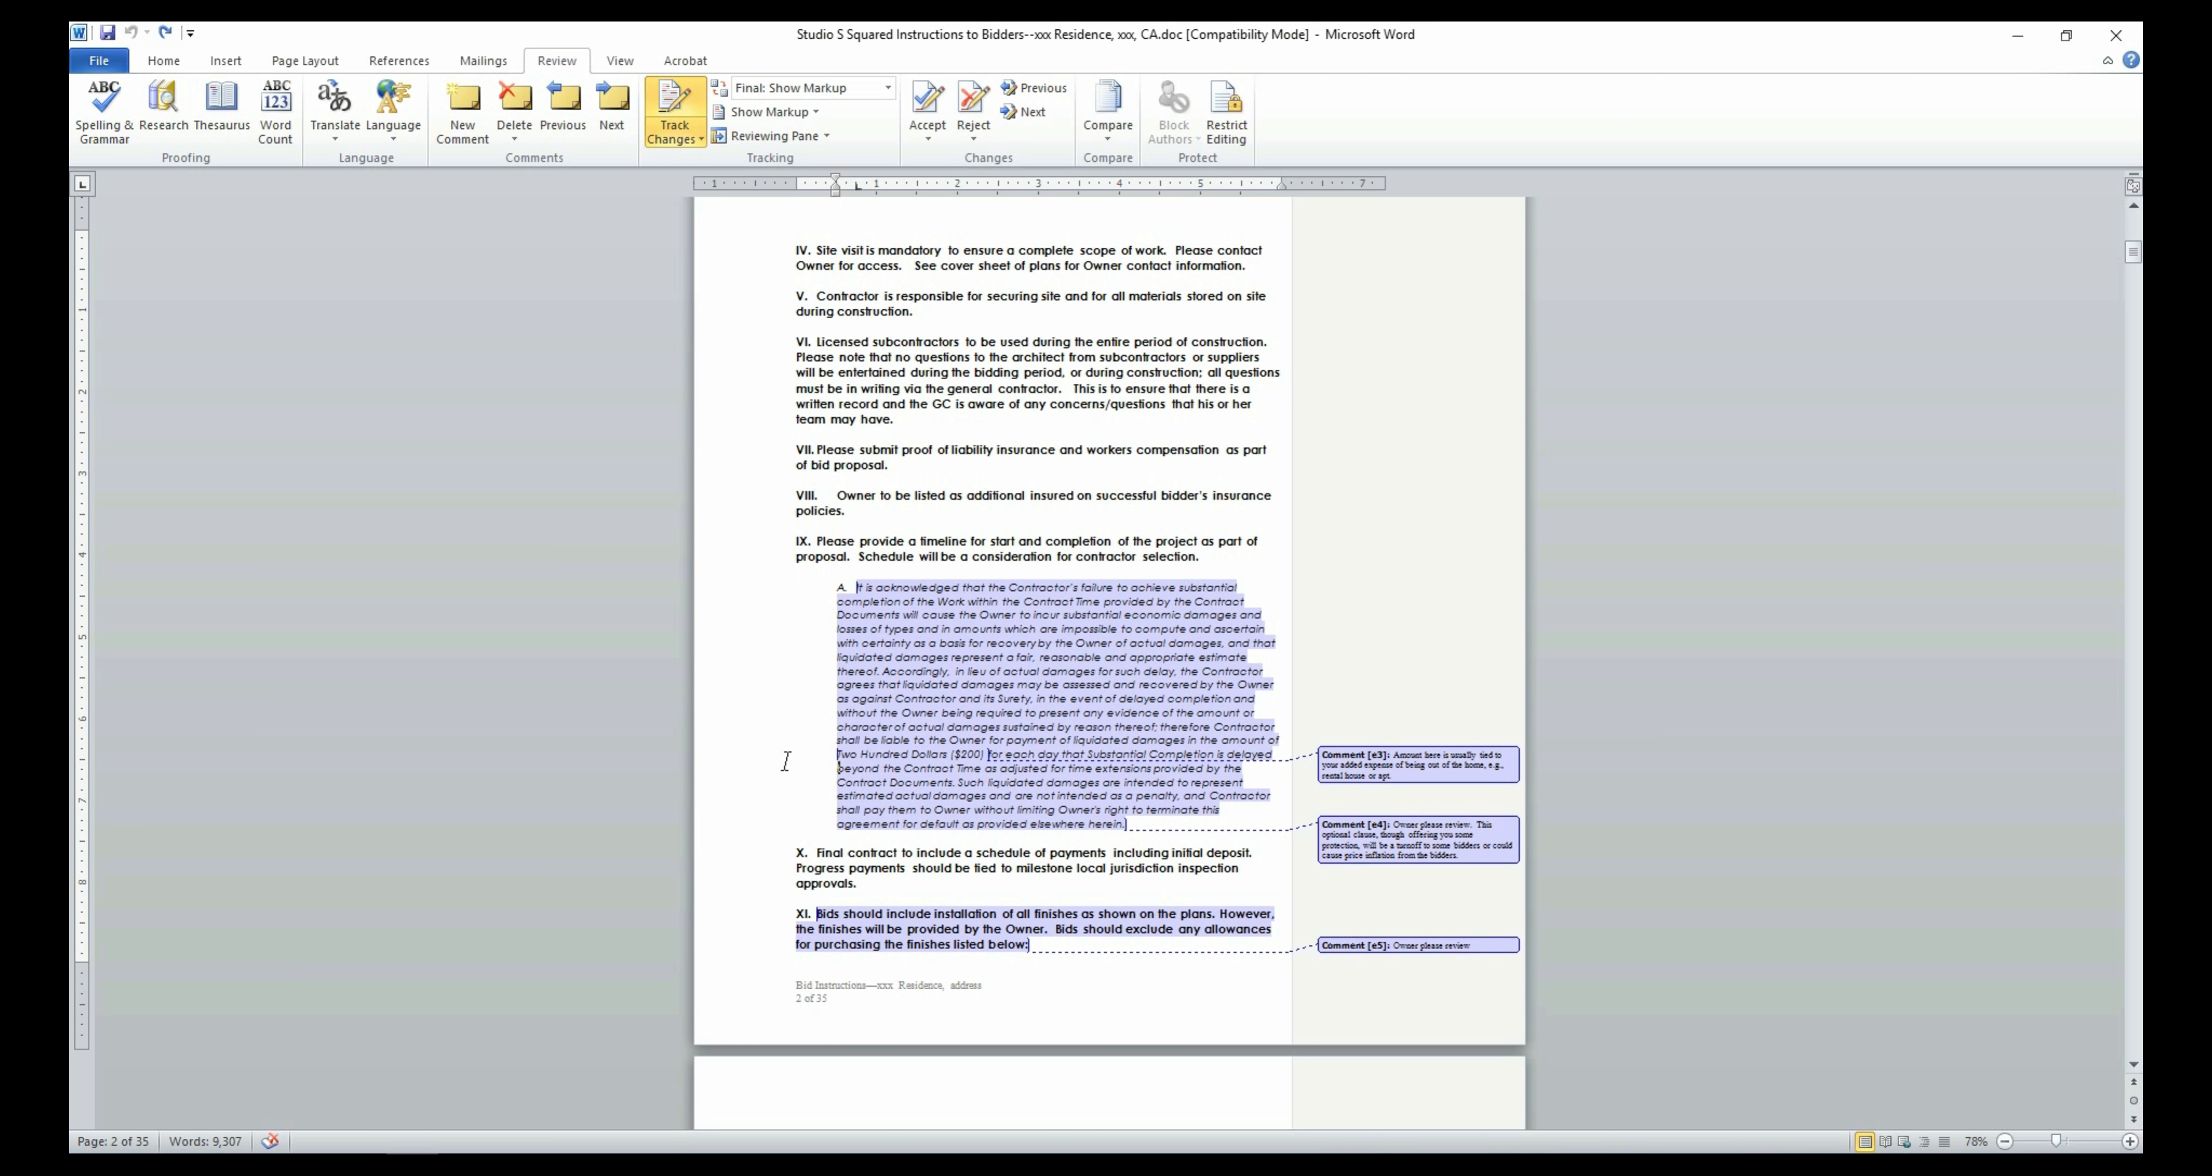But keep in mind that this clause may potentially discourage contractors from submitting bids as they cannot foresee all of the delays that may occur during the lifetime of a project. A good number of our clients remove this clause from the bid document.